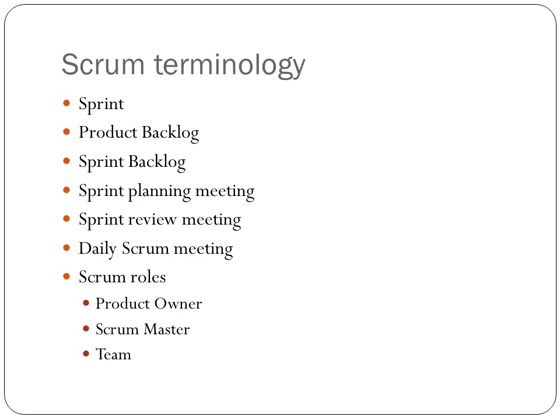Next comes the daily Scrum meeting. In the daily Scrum meeting, there are three things that are important. First one is, what are the things that are done since the last meeting? Next one is, what is the plan for today? The next thing is roadblocks or impediments that are preventing the developers or testers from doing their work.